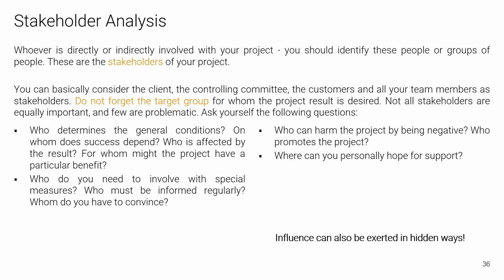Not all stakeholders are equally important, and few are problematic. We should now work out stakeholder roles and relevance by asking key questions. Who determines the general conditions? On whom does success depend? Who is affected by the result?